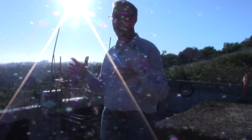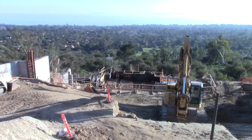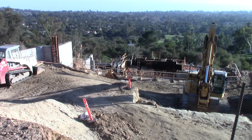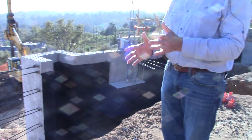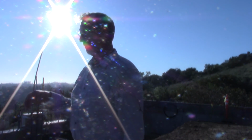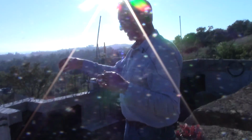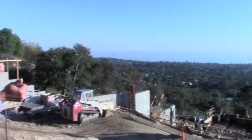So, as I said before, these exterior walls, I can't go any further outside of them. So this is my ramp down the center. It used to go all the way down to where you see the forming for the pool, but we take the ramp out stage by stage as we're developing a level. How I've figured this out is that it was great to get access to do the exterior walls. Yeah, much better.